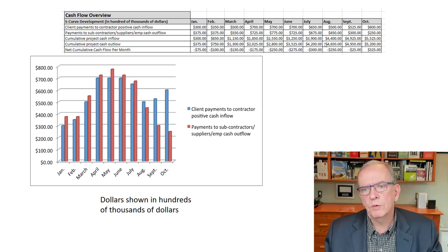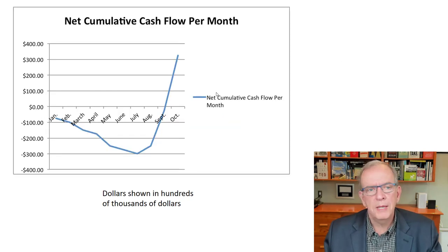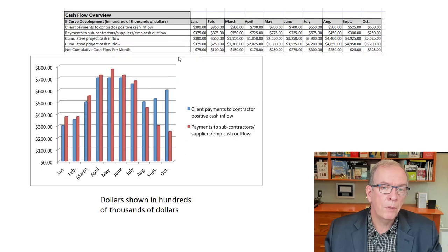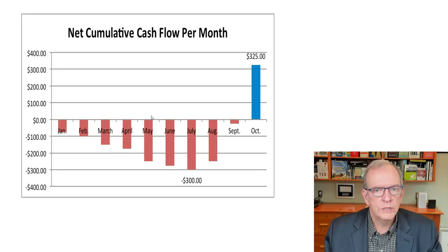Nevertheless, we might want to think, well, are there ways that we can mitigate some of that? So you can visually see it definitely when you look at it cumulatively. You can see, okay, so it goes negative, but then it starts to bounce upward. And at a certain point at the end of the project, it really bounces upward. Well, part of that would be the release of the holdback amounts. Depending how well you negotiated with your subtrades, for sure the client is releasing the holdback amounts once you're closing out the project and the time period has expired, generally 45 days after completion.